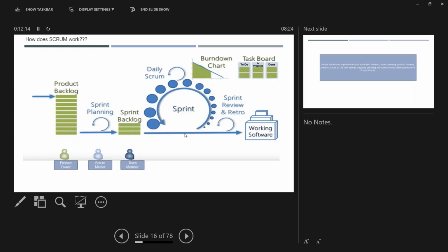For some teams, you will have 30 or 40 members as well. What they have to do is divide the people into smaller teams. Because if 30 people are talking, even if they take just 1 minute each, it takes 30 minutes. That's where people spend more time. But the rule here is you should not go more than 15 minutes, so you have to divide things. Then you will be able to finish it in 15 minutes. But we will not do it like that actually.